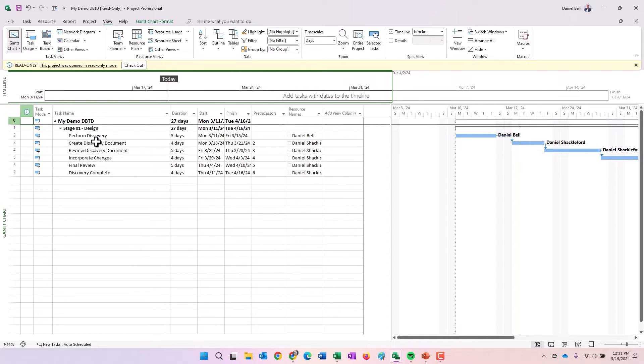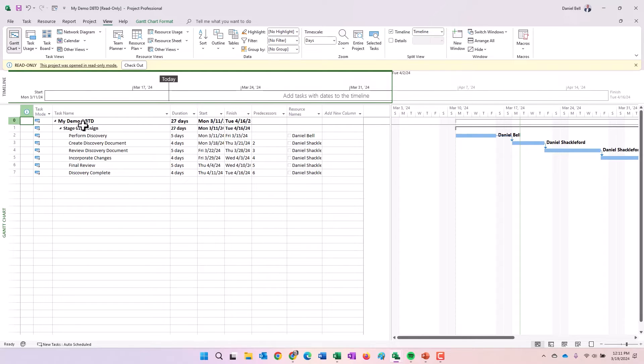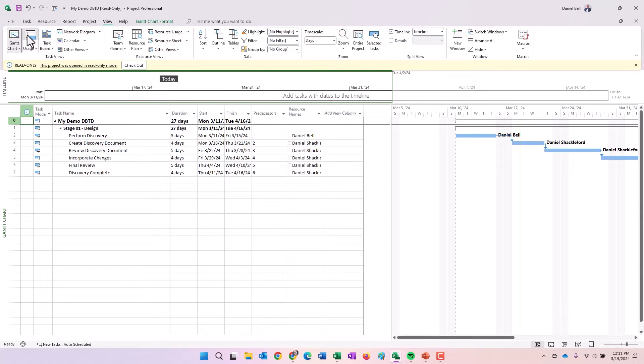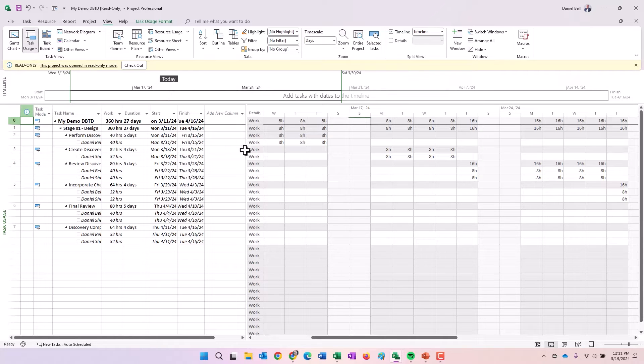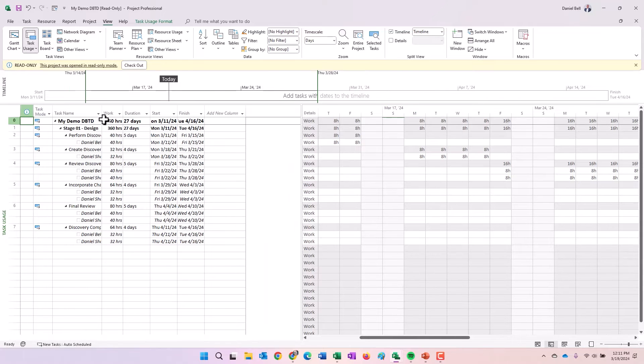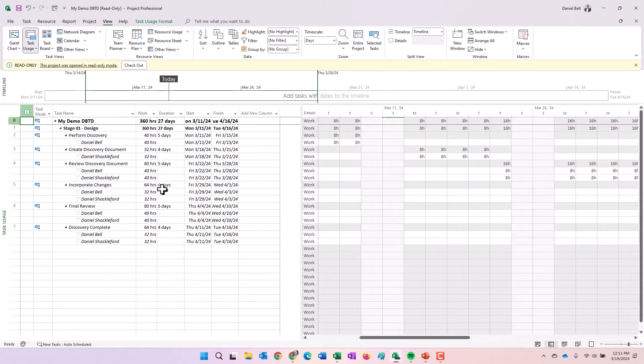What does it really mean if you're the status manager? So what is a status manager situation? It's a situation where some tasks, the updates from the timesheets will go to one person. Other tasks within the same project will go to somebody else. In order to use that functionality, we would go to the task usage view.